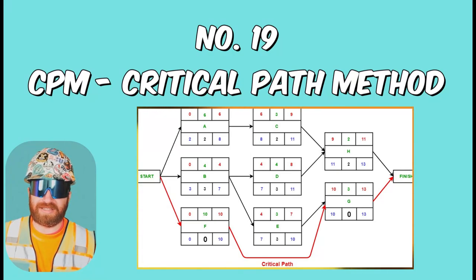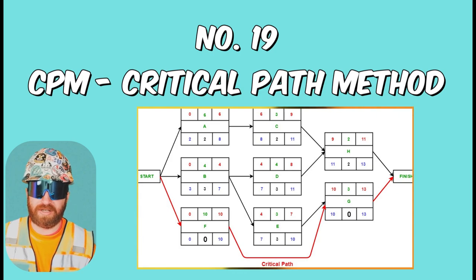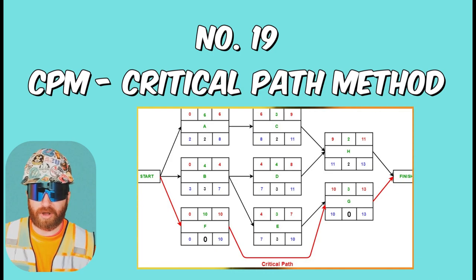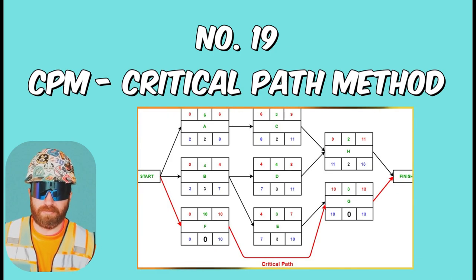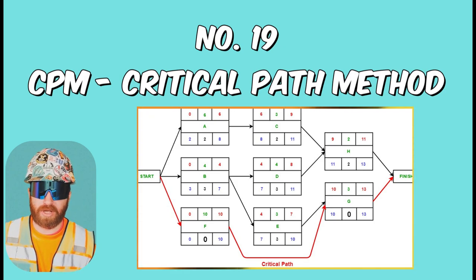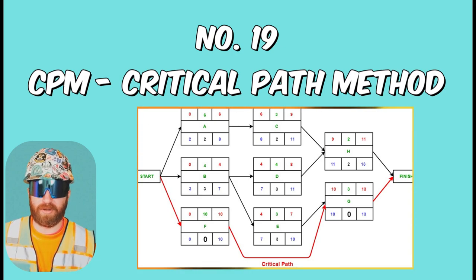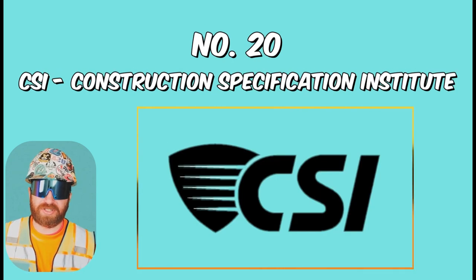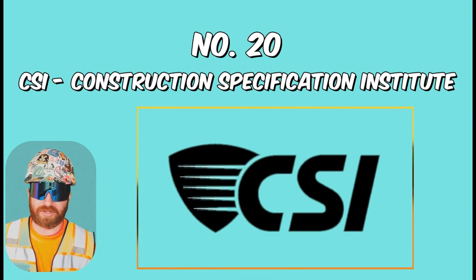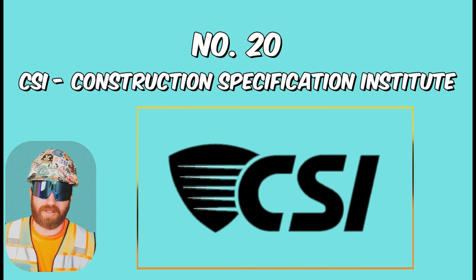CPM, or Critical Path Method, is a scheduling technique that shows you the longest sequence it would take for construction activities to take place. Many activities on a job site can happen at the same time; however, a critical path shows what activities must happen before the next activity can start, which creates a schedule with zero float. This essentially means how long it'll take to get the building done from point A to point Z. CSI, or Construction Specifications Institute, developed a standard layout for construction specifications which we see in the construction documents.